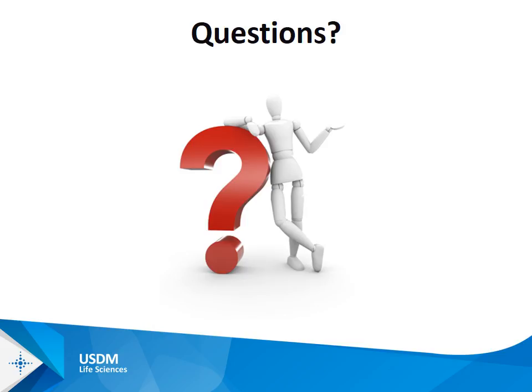We have a question from Richard. Can you differentiate between the scope of what you consider validation testing and UAT? Again, it's very much dependent upon the context of the system you're talking about. Typically, a UAT is where you are fleshing out and smoking out all of the most detailed functional expectations of every field on a form, let's say, and its expected behavior under a variety of conditions, and as many permutations of that as you've defined.